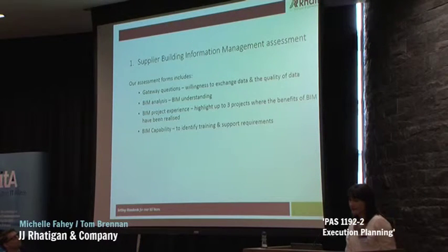The Supplier Building Information Management Assessment. Our assessment forms include the gateway questions, the willingness to exchange data and the quality of data to be exchanged, the BIM analysis, so their understanding of BIM, the BIM project experience, which highlights up to 3 projects where the benefits of BIM have been realised, and the BIM capabilities to identify the training and support requirements.